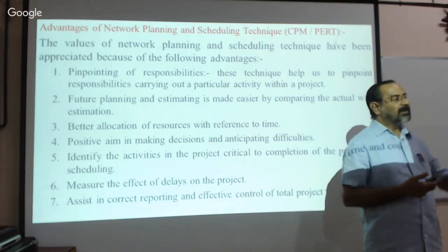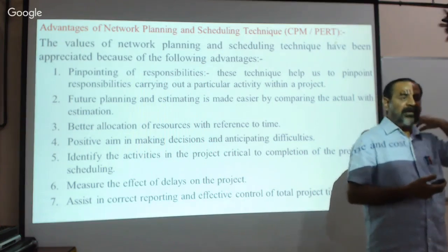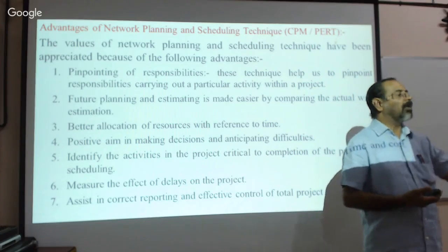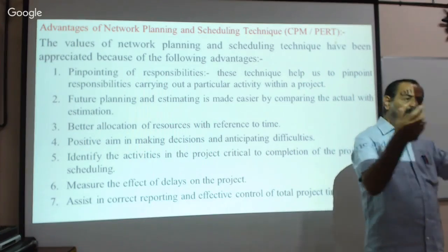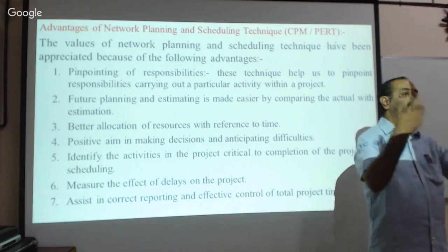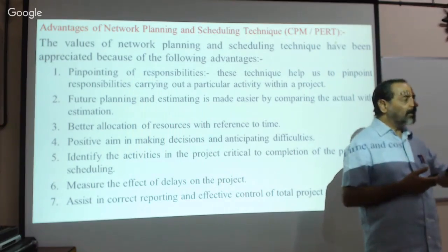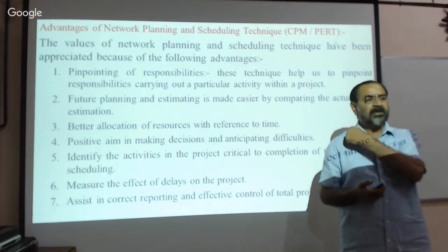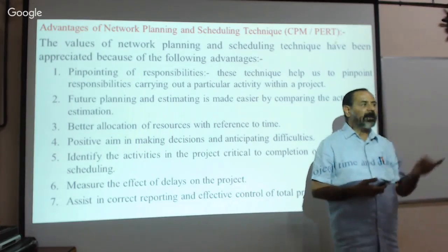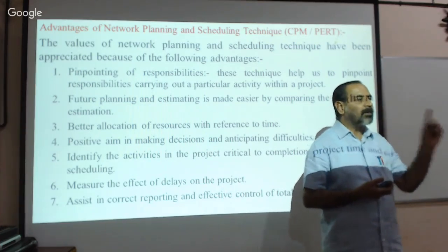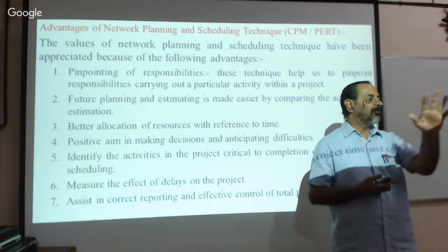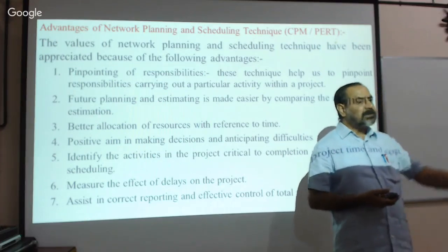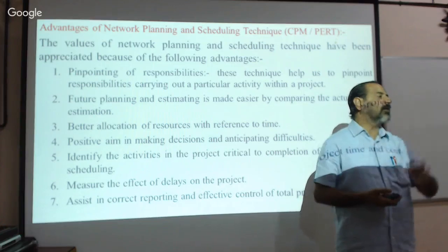Now see, number 1 activity we have explained. What we have discussed is for one apartment or one building. In a campus, you are going to build 10 apartments or 10 buildings. For each building, you have to prepare the network schedule, isn't it? Now, in a similar manner, let us prepare the network diagram for all the buildings, 1, 2, 3, 4, for all 10 buildings, and again prepare the master network diagram for all.